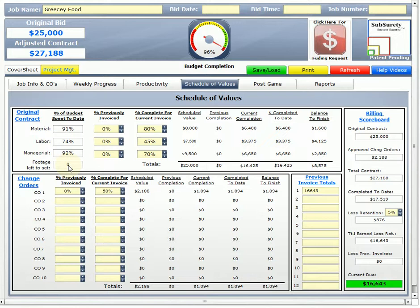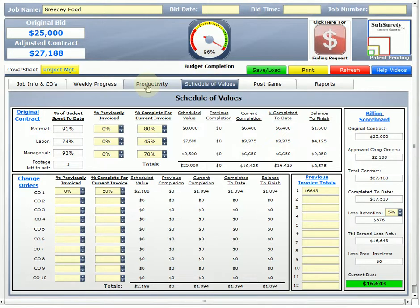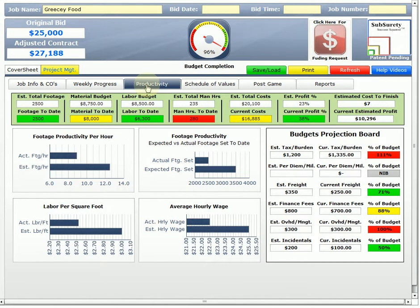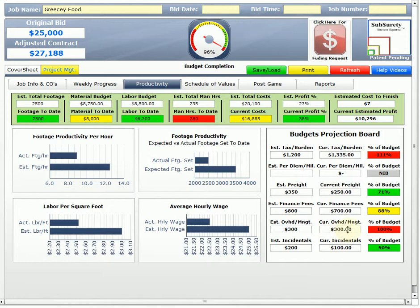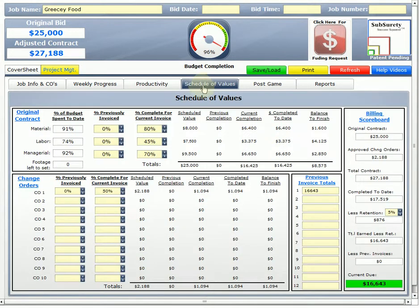That actually, in my mind, we can look at our budget completion. We've completed 96% of my estimated budget, but I'm done with the job. So, that's good for me because that means I was able to complete the job under budget and hopefully on time or better than the time. We can double check ourselves in productivity. And I'm greedy across the board except I'm a little over on man hours. I went over a little bit on my budget for taxes and I hit my overhead management estimated amount. But other than that, I'm exactly on or under what I had estimated. So, that's good. But back to the schedule values.